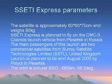We're already overdue for the launch, and that's because of some problems associated with the primary payload, primary satellite launch. The launcher is carrying 2 satellites for SSTL, the Surrey Satellite Technology Company. We have bought launch space on board, but those satellites being the primary ones, they have to be right, and they were unfortunately slightly delayed. Hence we have a launch now at the end of August, and everything's now looking pretty good for that launch.